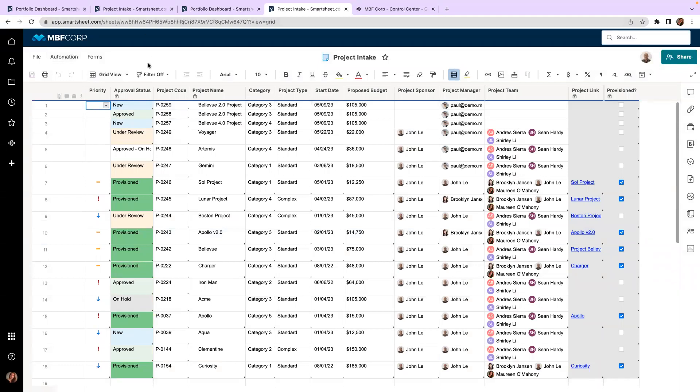Once my projects become approved, they can then be spun up automatically through Control Center and connected again automatically through Control Center to my overall portfolio. This will eliminate any manual effort and risk associated with that manual effort, as well as the time taken to manually spin up these projects.